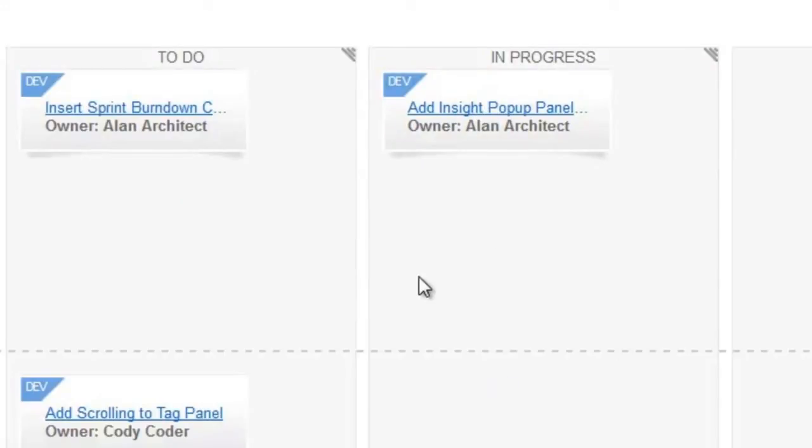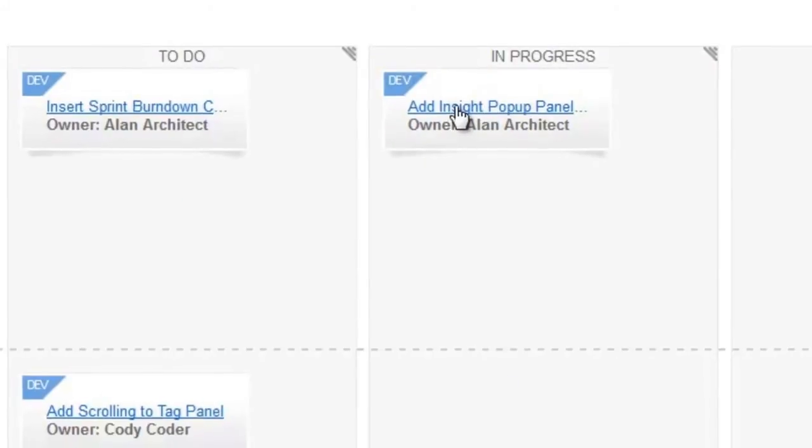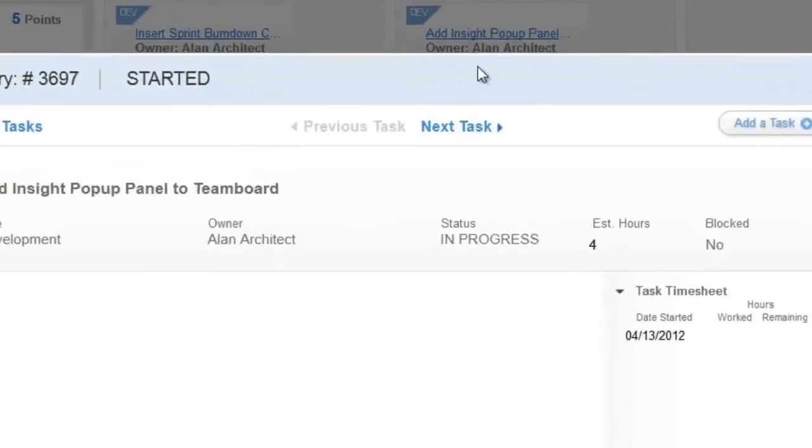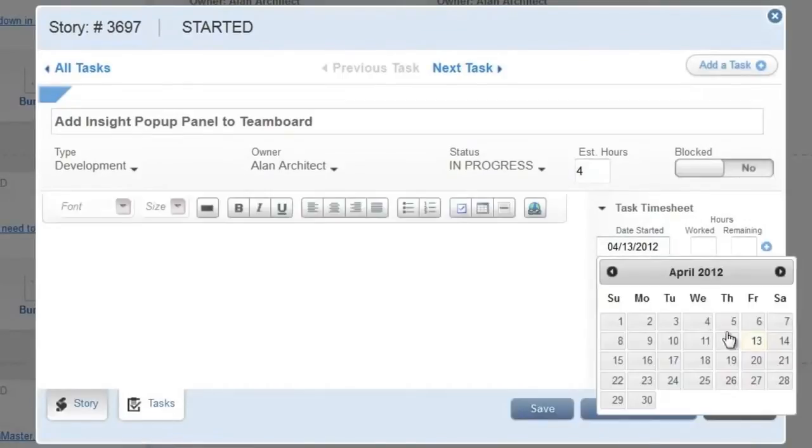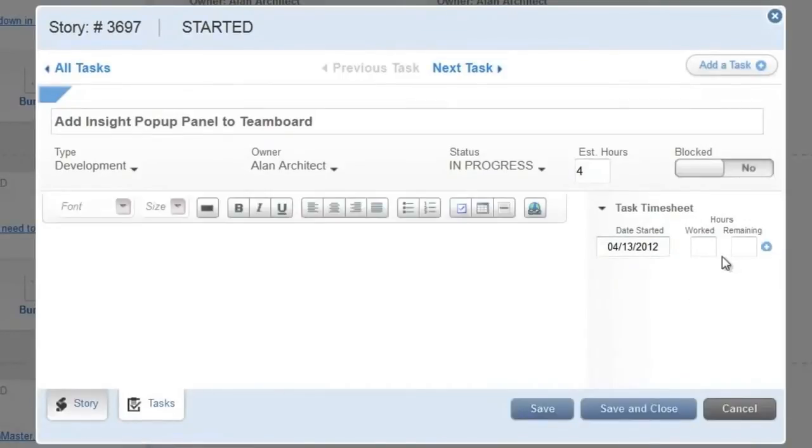To add the time worked on a task, open the task dialog and submit the hours worked and the hours remaining.